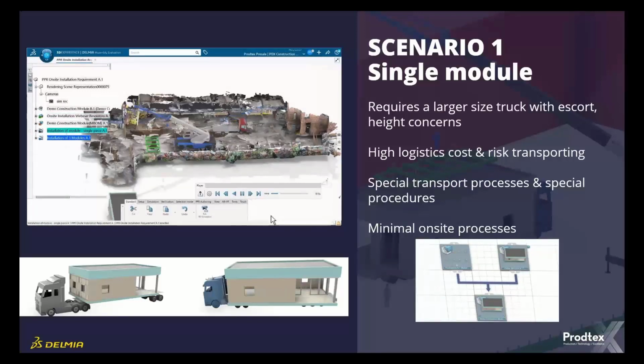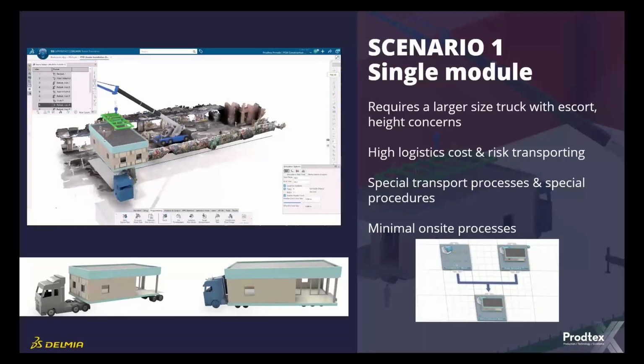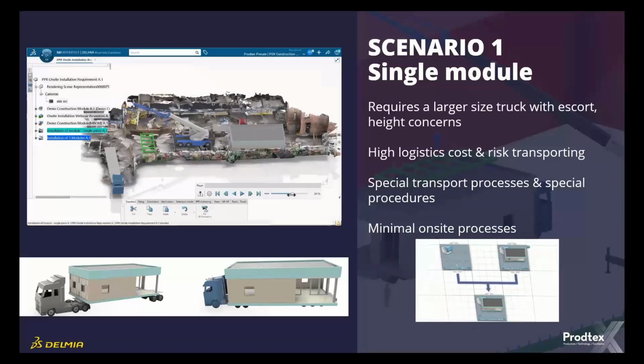We've potentially got issues on site. We have issues getting it close to the build site. You can see that we've had to park it to the side, the cranes within the fence, and actually that area that's not in the point cloud scan might not necessarily belong to us, so we can't lift over there. It is, however, quicker. So, that big one is faster to get it signed off, which means we get the payment quicker. But the logistics is a big issue here and so easily seen.